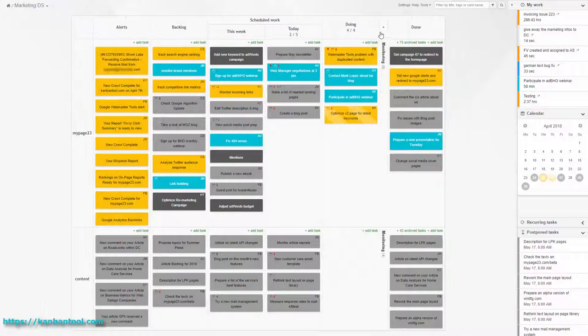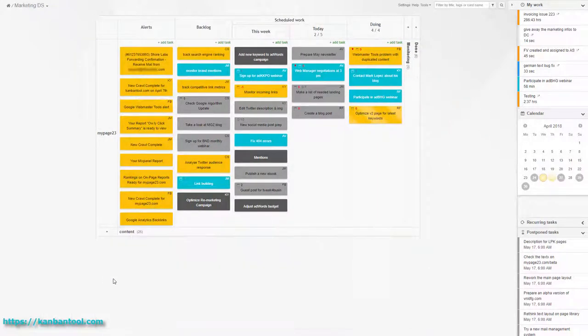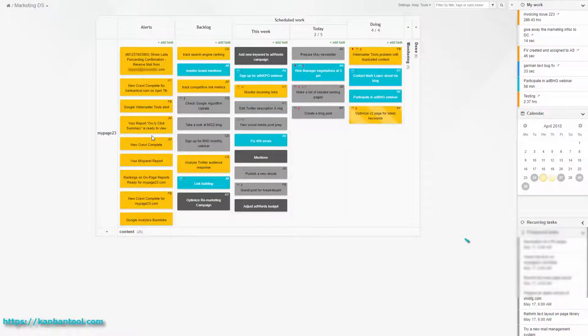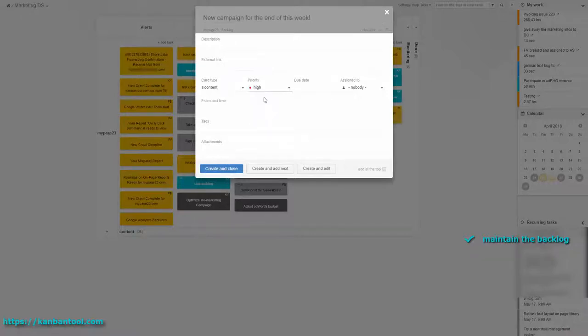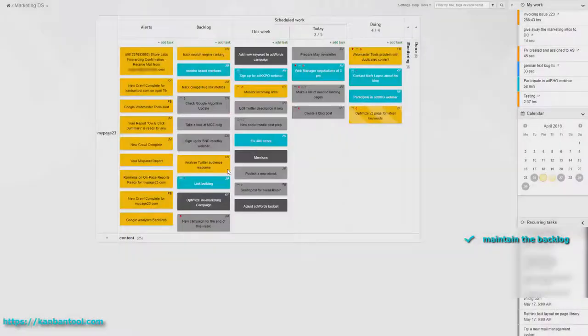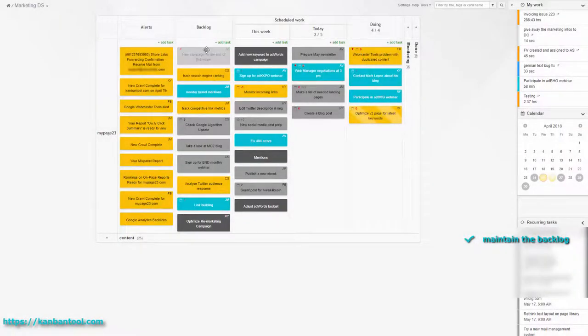We'd like to share a few tips on how to make this system stick for both the team and the managers. If there is anything new that the team should work on, it has to be placed in the backlog. Cards are always picked up from the top, so make sure that tasks with the highest priority are at the top of the list.